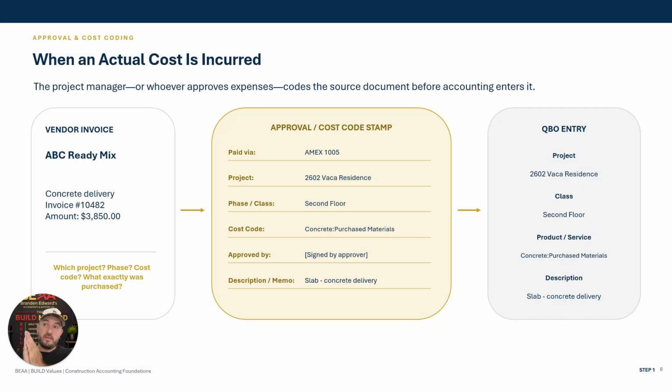So for the accounting to be accurate, and this is where the administrative burden increases on your accountant. Most of the time, people are just flinging receipts everywhere, and you're just getting your one or two accountants to tag everything as best as they could, and there might not be a lot of structure. Your project management may be tied down, and the dimensions of your accounting may be so broad. They're tagging things like purchase materials, subcontractor, without any phase or any work type or parent and sub item structure. So it's very general, and then it becomes very difficult to analyze later.